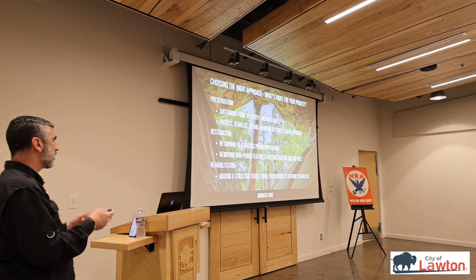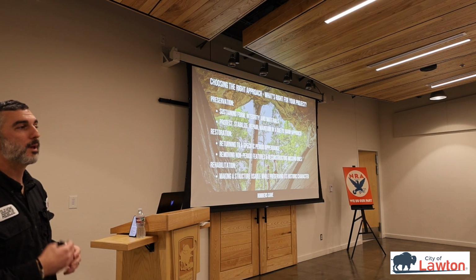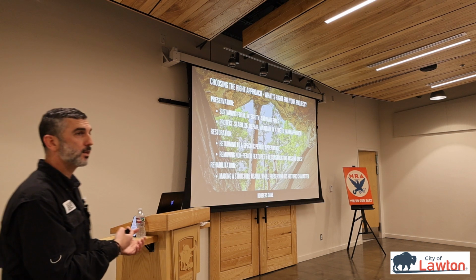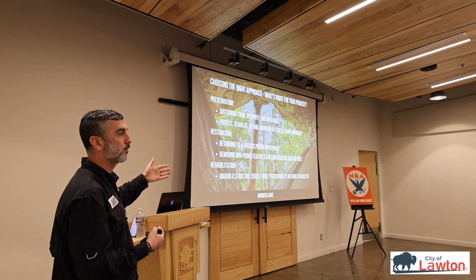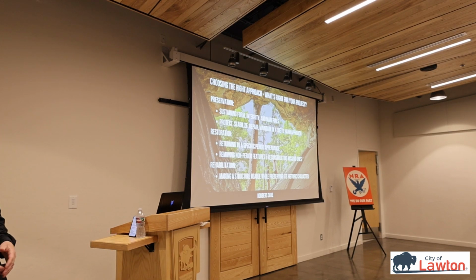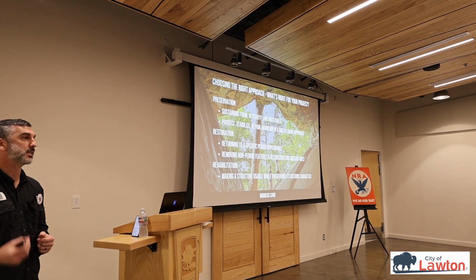A couple of cost considerations are these, but also quality versus cost. Maybe we have a $100,000 budget, but it's going to take $140,000 to do that. Are we going to do it one time for $140,000, or are we going to do it for $100,000 now and another $100,000 in 10 years? Again, the longevity of the materials used. Today's most building materials are not designed to last more than 15 years.